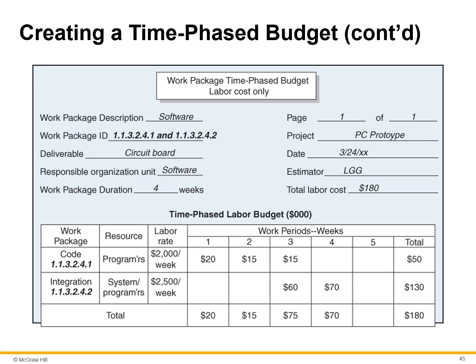In a few instances, an activity will include more than one work package, where the packages are assigned to one responsible person or team and deliverable. In this case, the work packages are consolidated into one activity, as seen in this figure, which includes 2 WPs. The first WP, 113241, is distributed over the first 3 weeks.